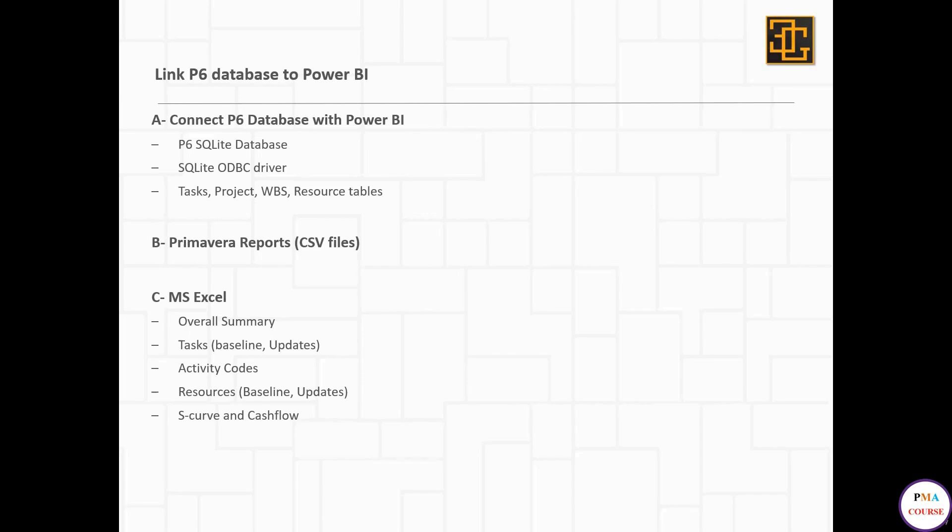Third will be the activity codes. Fourth will be the resource tables, baseline or updates. And finally, we'll take the S curve and cash flow. These are the information we're going to take from Primavera.